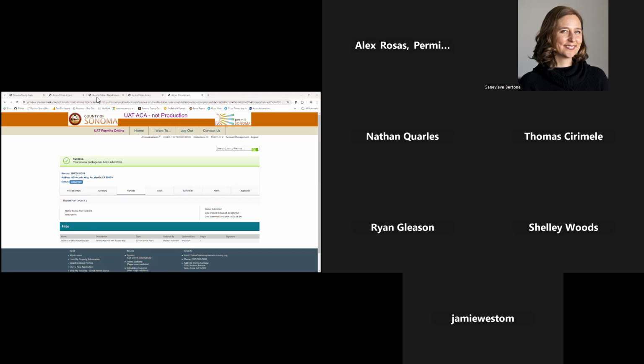First, we assess the plan check fees that allow our staff to perform the review work. We're in essence looking for code compliance, compliance with conditions of approvals, policies, that kind of thing. Once all the disciplines provide their reviews and approvals, we move toward permit issuance, and then there's a second set of fees, the permit or inspection fees, that get invoiced and should be paid in order to issue the permit to then begin construction.